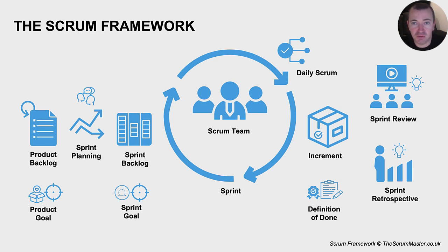Adaptations to the product backlog often result, as more will now be known about the product and the domain within which we are operating. Incorporating these adaptations into the product backlog will help us to deliver a more valuable product in future. In the sprint retrospective, the Scrum team looks for ways to overcome issues and improve its ability to create the product, often starting from the next sprint.